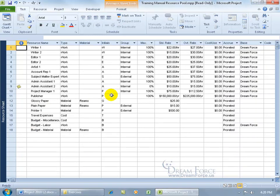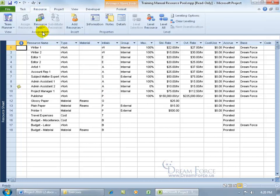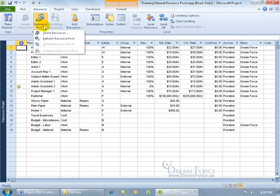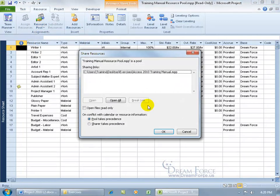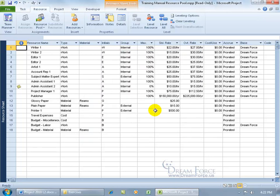If you want to find out what other project we're sharing resources with, or to link up and share this to another project, click on the Resource tab, go to the Assignments group, click on the Resource Pool drop-down arrow, and click Share Resources. You can see the link is pointing to the Access 2010 training manual project file in the Exercises folder. When you open Access 2010, it will have a link to all these resources to assign to tasks within that project.